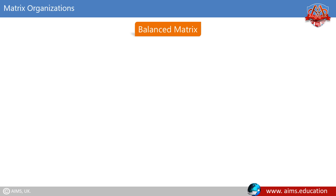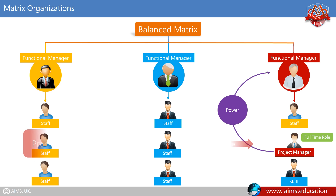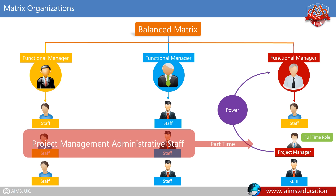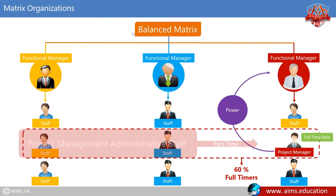In a balanced matrix, power is shared between the functional manager and the project manager. Although the project manager has a full-time role, he has only part-time project management administrative staff. Up to 60% of the project team in a balanced matrix structure are full-timers. The project manager is assigned on a full-time basis; however, support staff are usually part-time rather than being fully dedicated to the project.